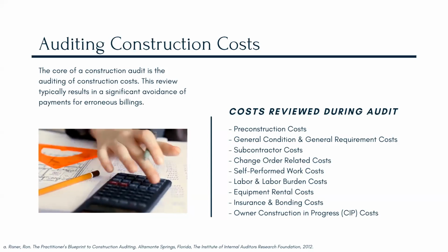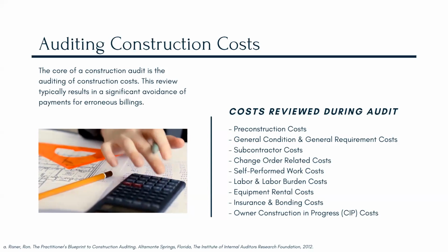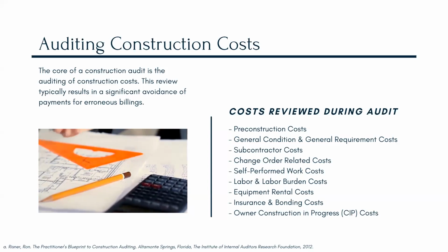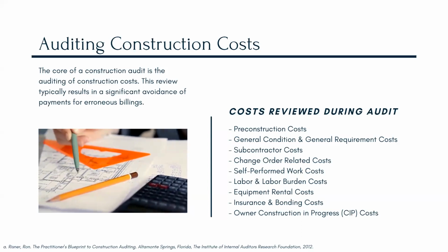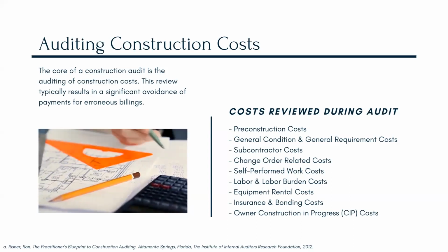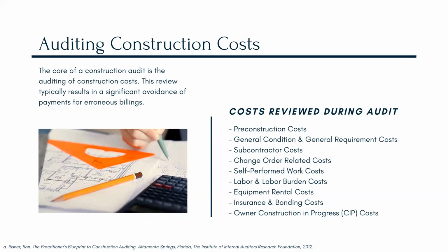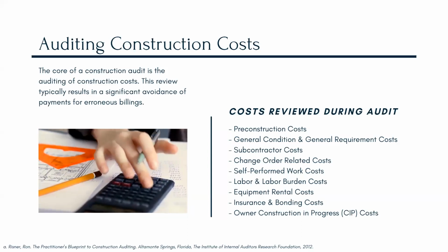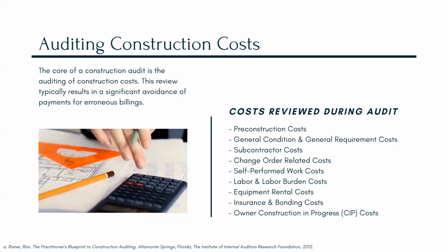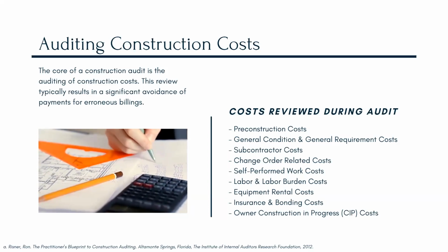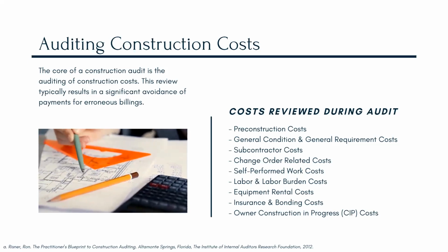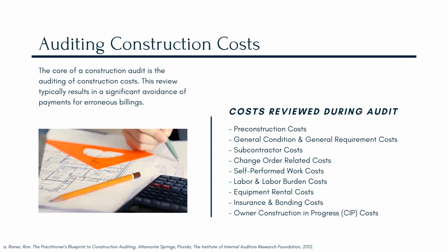And what we mean by the labor and labor burden, labor is the rates or salaries that the staff on site are actually paid. The labor burden is all the additional costs related to that labor. Those could be payroll taxes, FICA, FUTA, SUTA. It can be workers' compensation, other insurance, other benefits.